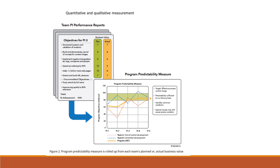In the Inspect and ADAPT we would also look at the quantitative and qualitative measurements and bring out some matrices. This one here shows us that we dipped on one team — it was quite low — and we could then do an investigation and problem solving workshop to find out why we had these dips and solve the problems those teams may have had. That's the idea of the measurements taken on these matrices: to identify the problems.